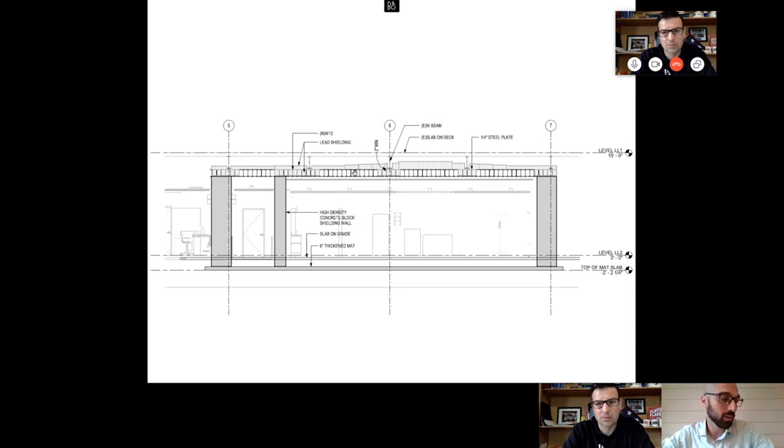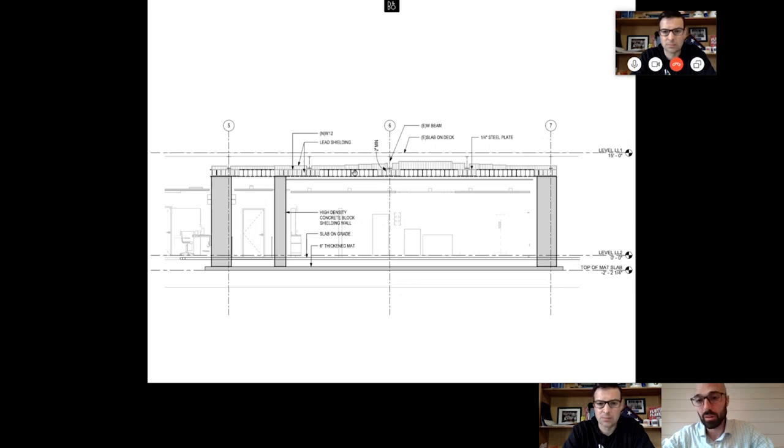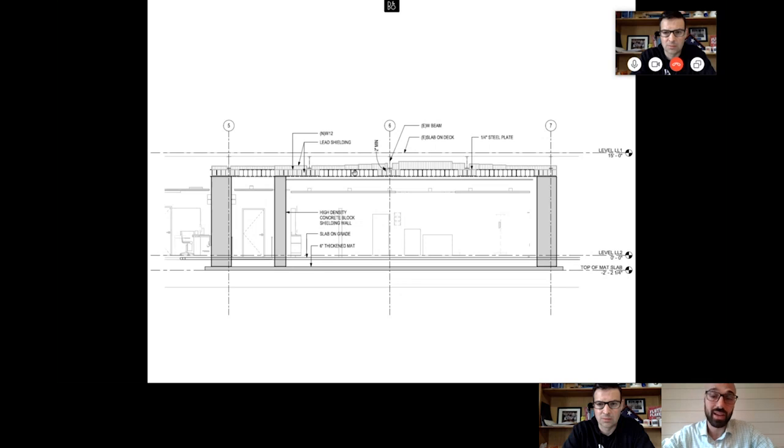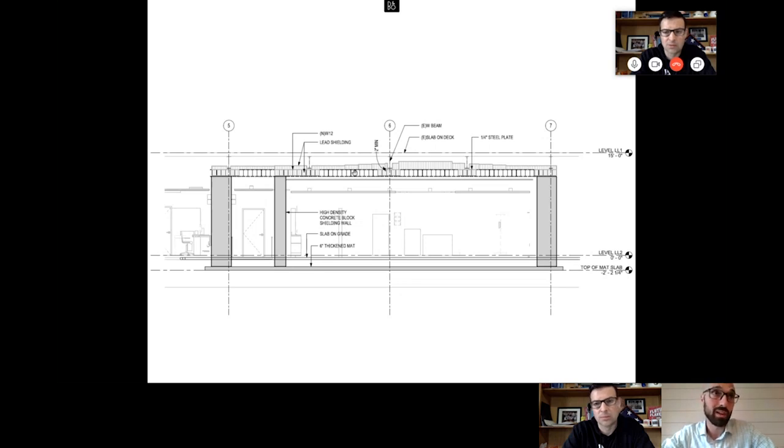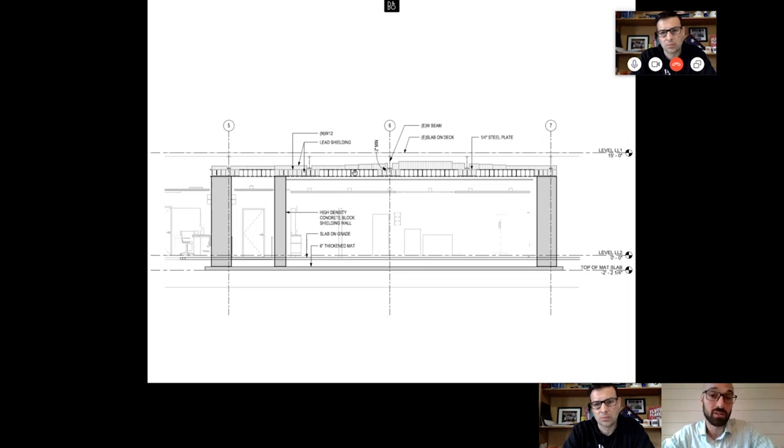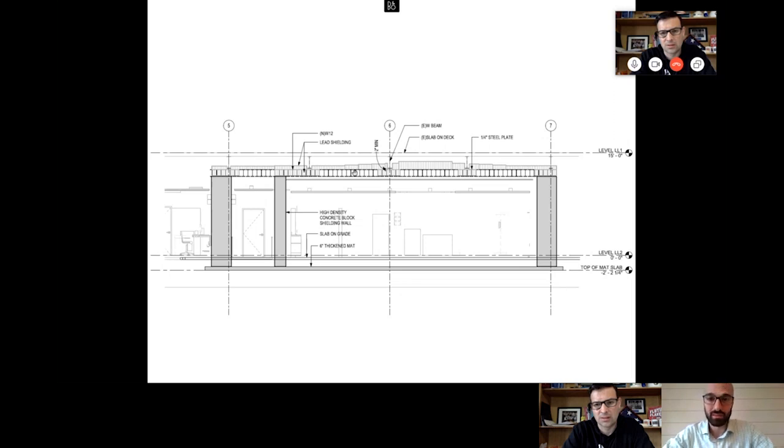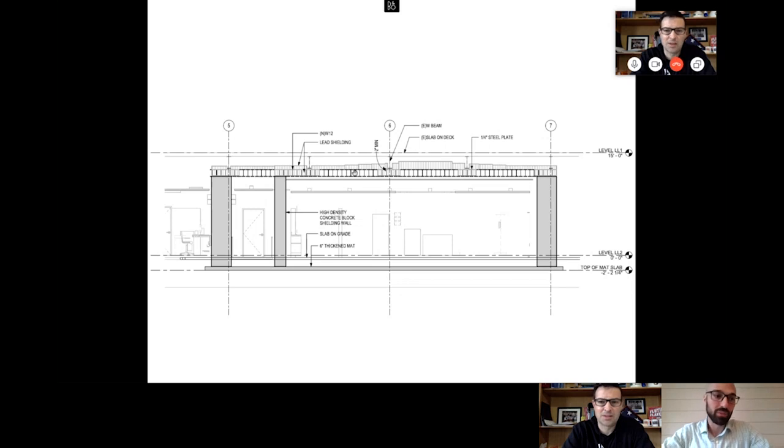Each one of these beams would have had to have gone into place one at a time, stacked with lead brick, and then the next beam put on, welded, and then stacked the brick again. So it would have been a really slow process. We expected it to also delay the schedule by about four months just based on how productive we would be doing this plan.